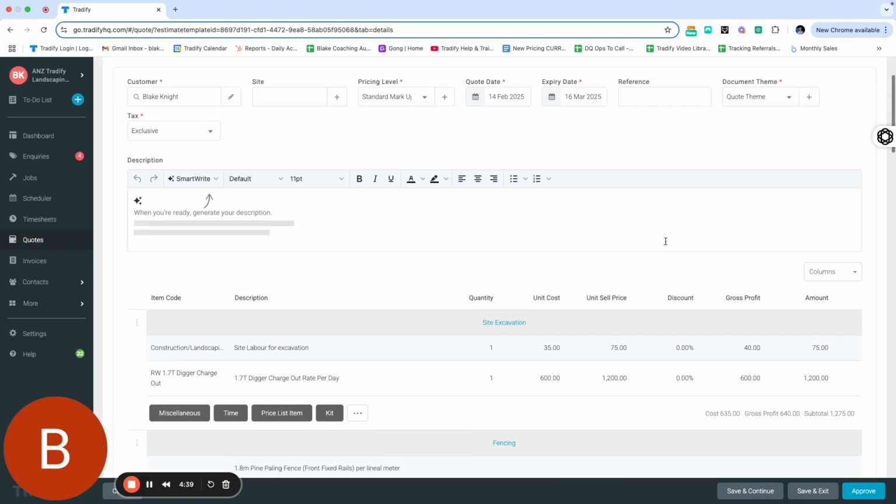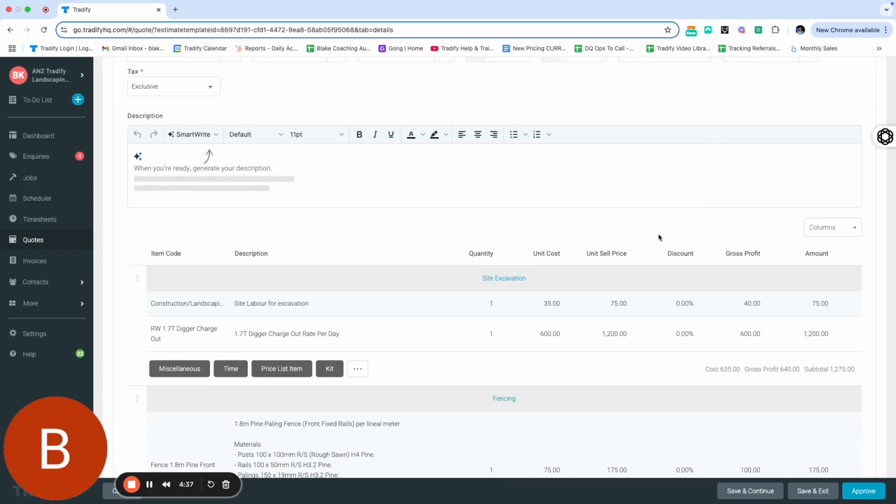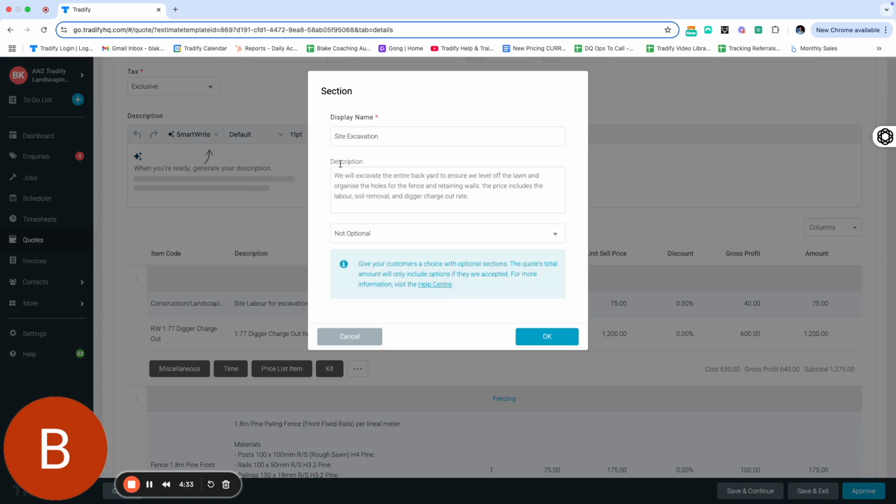So first of all, what's important is when you set up your quote sections, have your scope of work and description, what the client's going to get inside here. If you can, so they have what the client is going to receive for their job as a scope of work, but also that's going to be a good scope of work to use in a task that the employees can refer back to so they know what to do. So super important you put that in there.